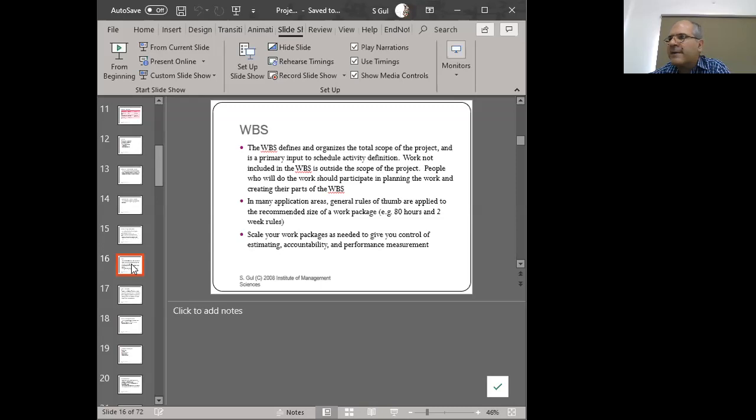For example, foundation digging takes a minimum of 6 days. So if you've got a heuristic like that, you shouldn't schedule your digging of the foundation to be in less than 6 days. You know, you've got some sort of a learning or some sort of a ground reality that's present with you. So if you have that, you keep on using it.